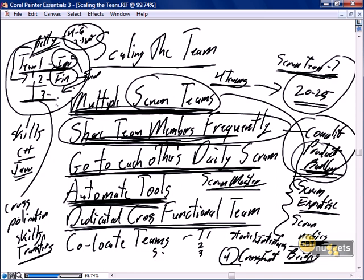So team number 1 is working on stories 1, 5, and 15. Team number 2 is working on stories 2, 18, and 36, and so on. And story number 42 needs information from story number 5 as input. And story 42 is going to produce the output that story number 36 is going to use. So recognizing that this story needs to have understanding of what's going on in story number 5 and needs to have understanding of what's going on in story number 36, often these focused, dedicated cross-functional teams will be put in place that deal with all of those stories that cross team boundaries to ensure, again, that we have a cohesive final deliverable that's going to commit to the product.